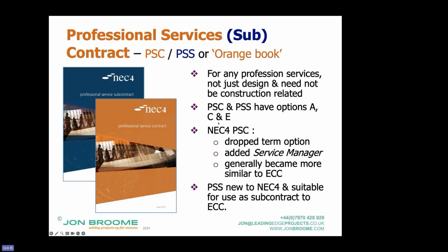It has an option A, activity schedules. If you can price it up and you complete that activity, it has an option C, a target contract. And it has an option E, which, up to NEC 4, was an input-based contract in that they tendered rates, and it was how long have you used them times that rate. NEC 4 at the time, quite controversially, said actually we expect your consultants' rates to be worked out on an open book basis. And that was a big shock to the consultancy profession.